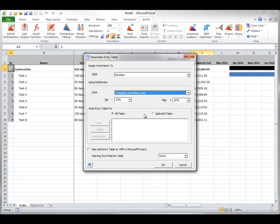In the Build Entry Tables section, you can choose to build a parameter entry table for all tasks in your project or just selected ones. For some projects you might want to apply a range to every task; for others, just a group of tasks. For this illustration, the parameter entry table will be built for all tasks.